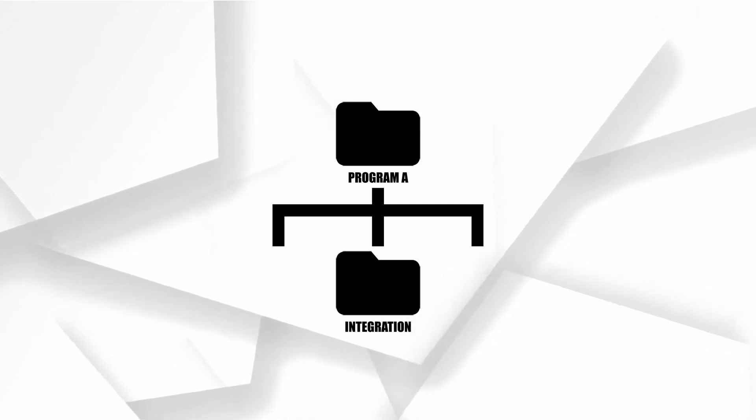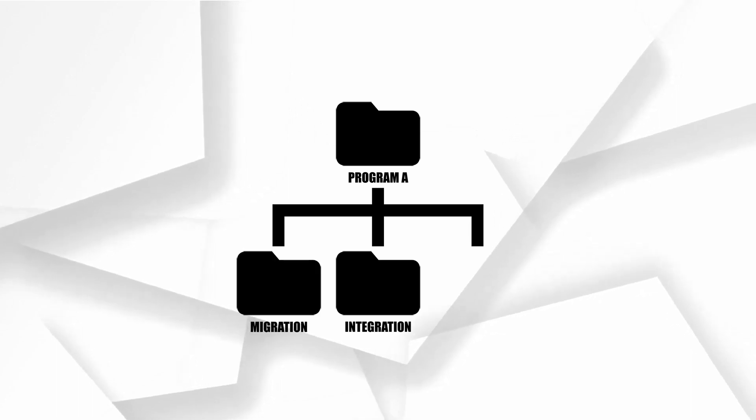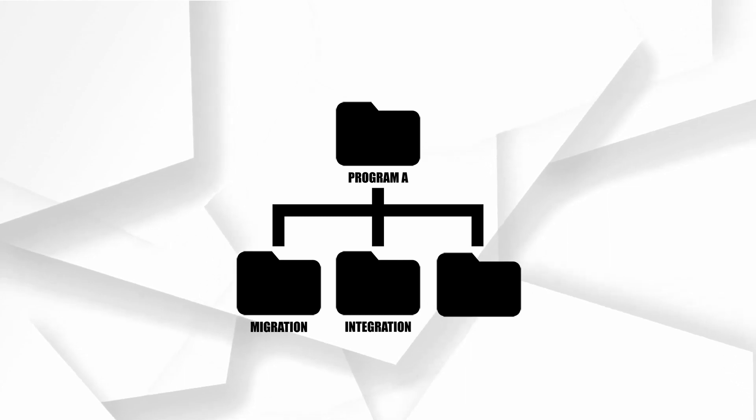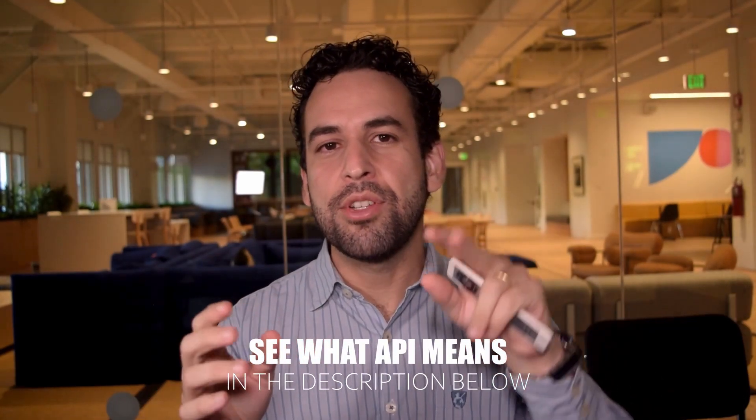Now let's imagine you are a corporate person working in a program or on a project — say, in an integration role. Your main folder will be called the name of the program, for example Program A. The next level of folders should be named for your projects: one folder called integration, one called migration, and one called reports. For your integration folder, you'll have files for planning, files for reports, and Excel files that create a matrix of APIs and integration endpoints connecting one software to another.